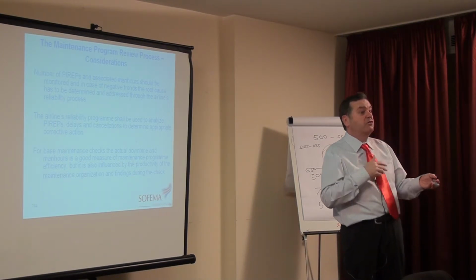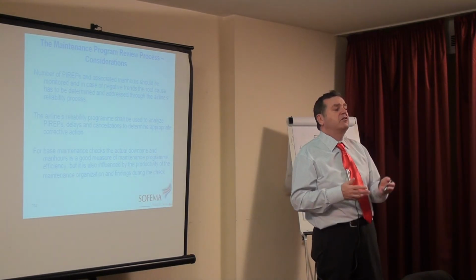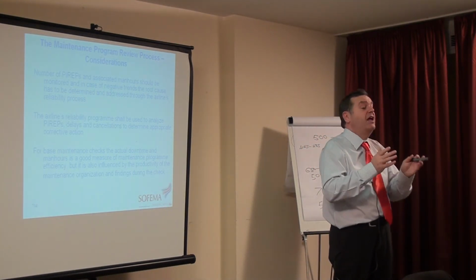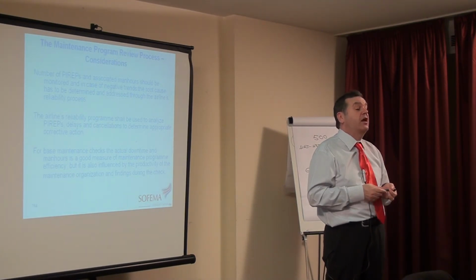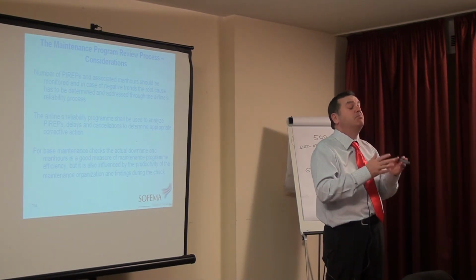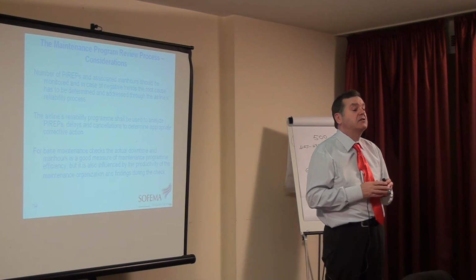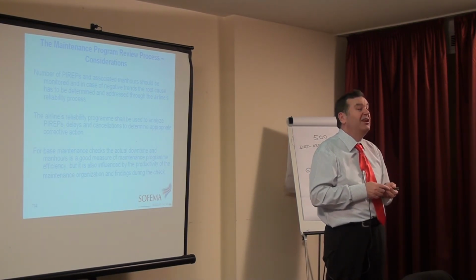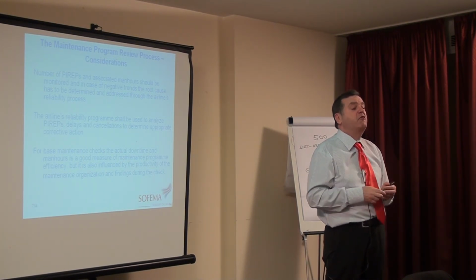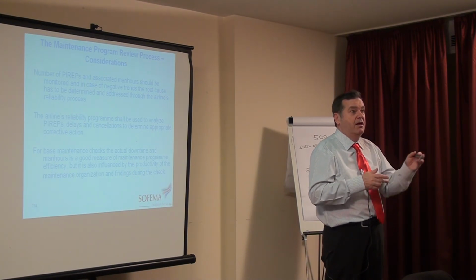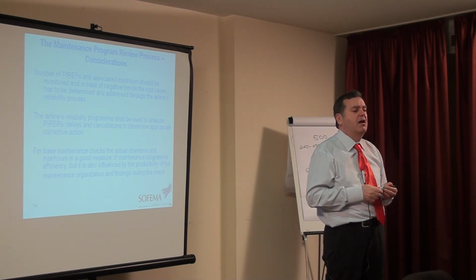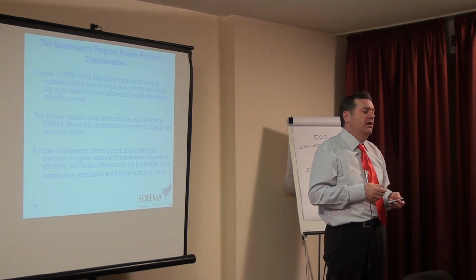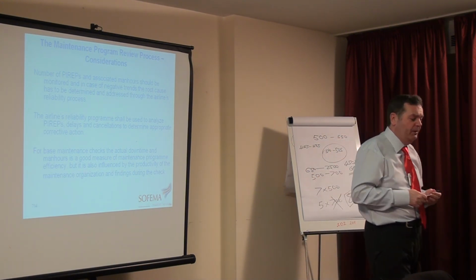The airframe mods, the engine mods, the fuel tank mods take 30 days. There is 6 days of radio work, but the radio guy spends 30 days on the aeroplane. So in actual fact, he's booking 24 days to that project when he's not really working. And what happens, he makes himself busy. He's pottering around and doing stuff, but he's not efficient and he's not effective. And this was normal. Again, it comes at a price. All these behaviours come at a price.